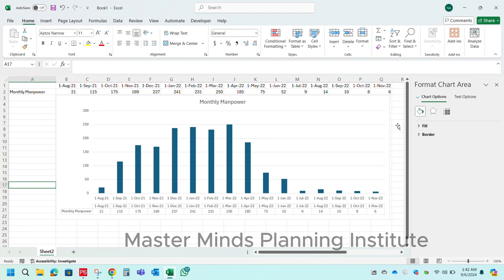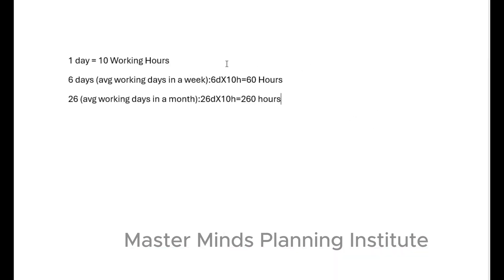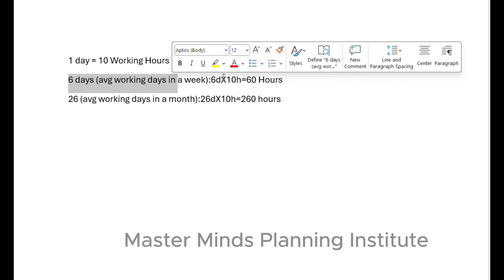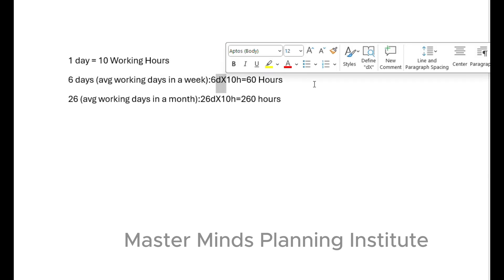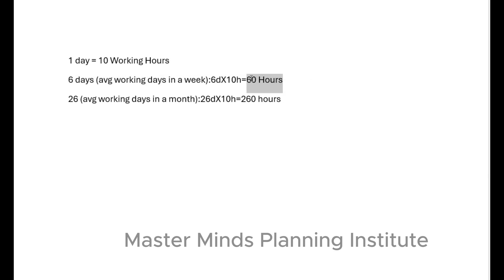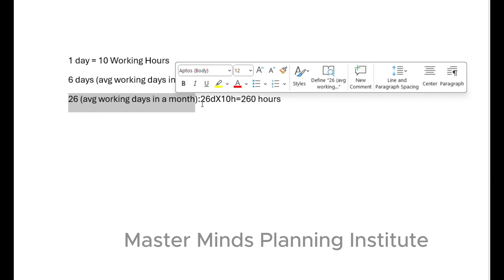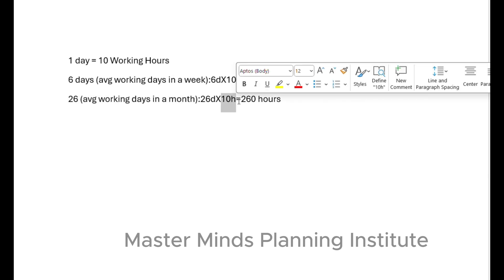Now your monthly manpower histogram is ready. Here is the explanation of why I am using 260: in a day we have 10 working hours, and in a week we have 6 working days. So 6 multiplied by 10 equals 60. Assuming in a month we have 26 working days, 26 multiplied by 10 equals 260.